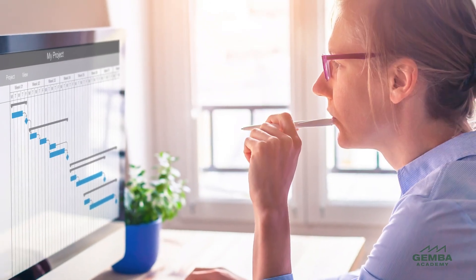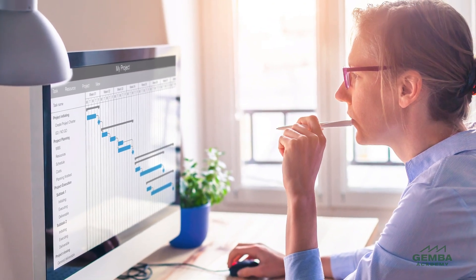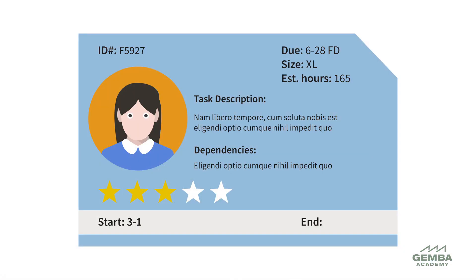The traditional approach to project planning involves breaking the project into tasks, then assigning start and end dates to tasks. Likewise, Kanban planning breaks down projects into tasks and estimates how long a team will need to complete all tasks. However, Kanban planning focuses on the probabilistic estimates of time rather than exact dates for creating a work plan.